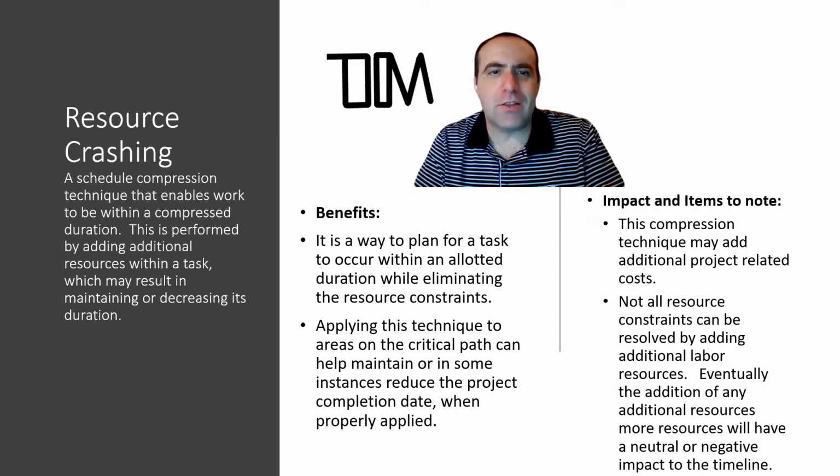Let's take a look at both the benefits and impact. Benefits: a way to plan for a task to occur within an allotted duration while eliminating the resource constraints. Applying this technique to areas on the critical path may maintain or in some instances reduce the project completion date when properly applied. Impact: this compression technique may add additional project-related costs.